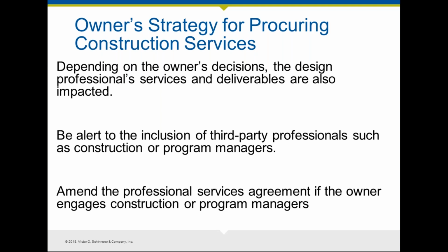You don't want to be the last to know that they intend to break up the construction contract into different packages. If they are using third-party professionals like construction or program managers, you need to know that and make sure that your services are coordinated with the services that the construction manager is providing. This is not that unusual an arrangement these days, but again, your services and what you're providing to the owner need to identify any known third parties that will be working on the owner's behalf to put this construction into place.